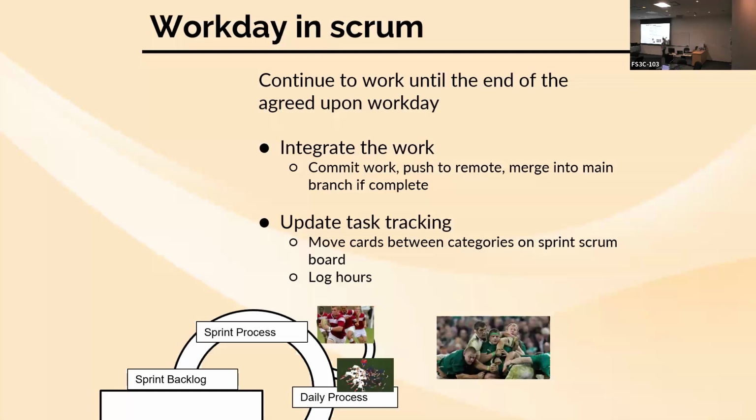So put everything into in progress that you are currently working on. Put everything into to check when you're done working on it. Make sure you log your time on those cards when you're done working on that task. So be like, this task took me 5 hours to get done. So you can see how long it actually took you compared to your estimate, and you can get better at making estimates as time goes on. You can see if there's any major red flags that are coming up for you on a consistent basis, so you can avoid that in the future. And then you move forward from there, and that takes us through the entire process.